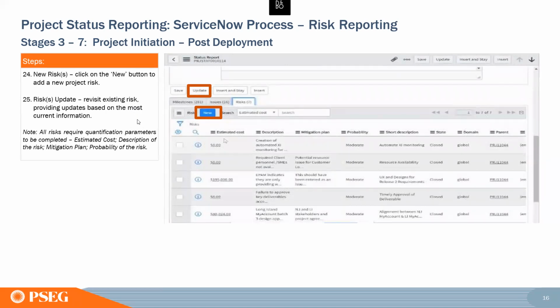So your risk registers will start to be audited to make sure your risks are if-then statements, meaning I'm not just saying my risk is storm. My risk is: if a storm occurs during this month, this is how my project is impacted. So it's a clearer, more definite wording of what the risk is and what is impacted if that risk becomes an issue. You'll see a lot more of that going into next year.